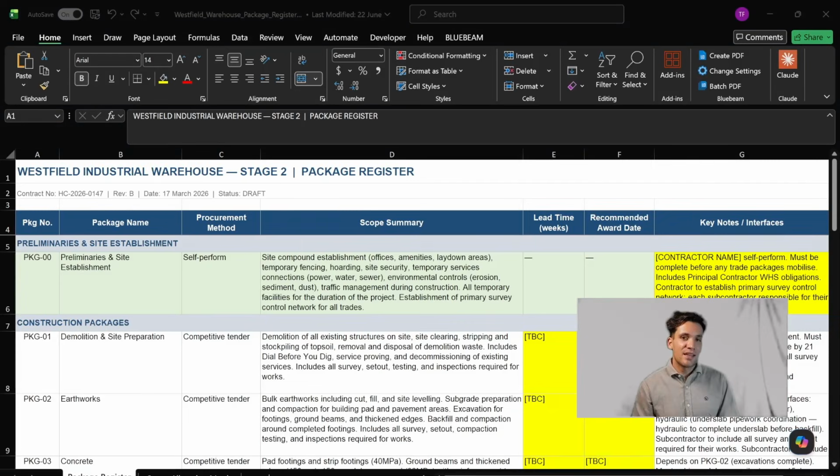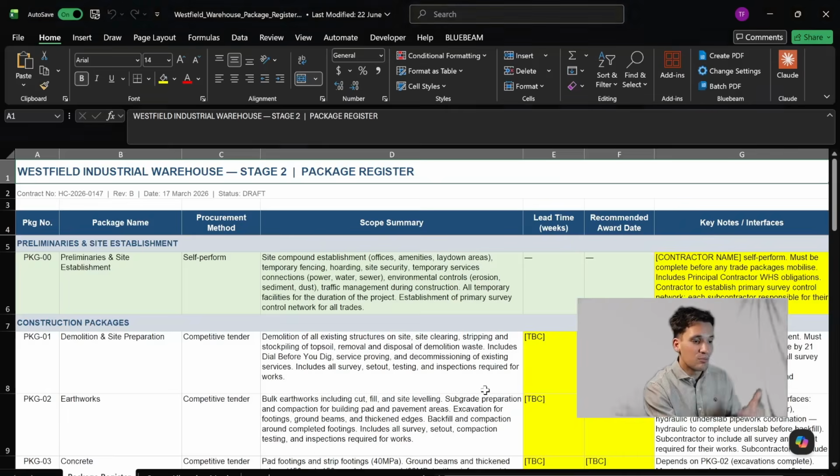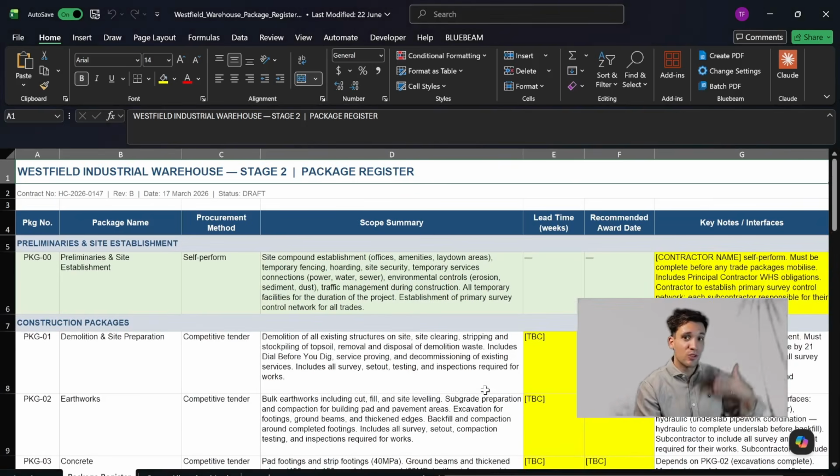One of the cleanest examples of this is the procurement process. We have the head contract requirements, the drawings and specifications, the project we have signed up to deliver. The drawings tell us what we're building, the contract and specifications tell us what requirements we have to follow. When we actually do our procurement, we're really going to break down all of those requirements, the contracts we have signed up to deliver, and then we're going to reformat and pass them through to our subcontractors in our standard templates.